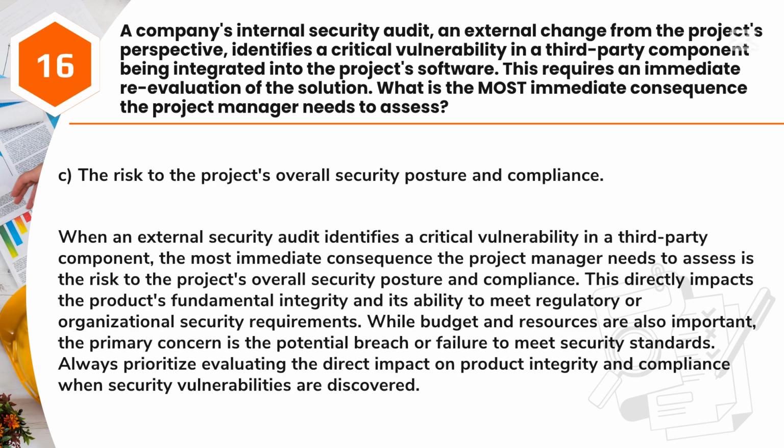Answer: C. The risk to the project's overall security posture and compliance. When an external security audit identifies a critical vulnerability in a third-party component, the most immediate consequence the project manager needs to assess is the risk to the project's overall security posture and compliance.